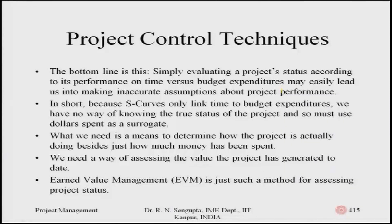We need a way to assess the value the project has generated to date and balance that against what was planned. Earned Value Management is exactly such a method — it assesses project status to determine whether actual work in progress is in line with what was planned, providing a more complete picture than S-curves alone.